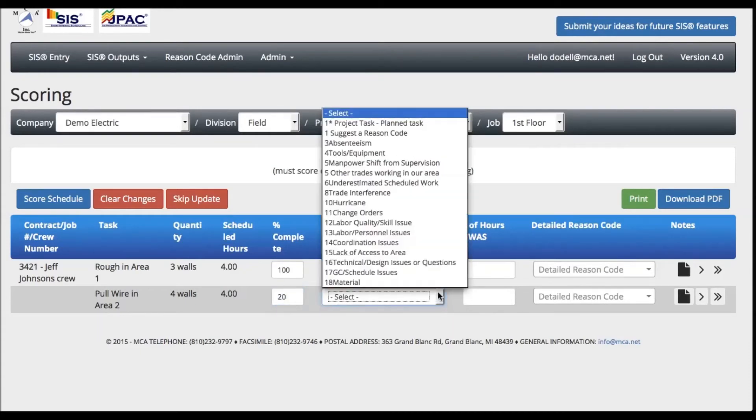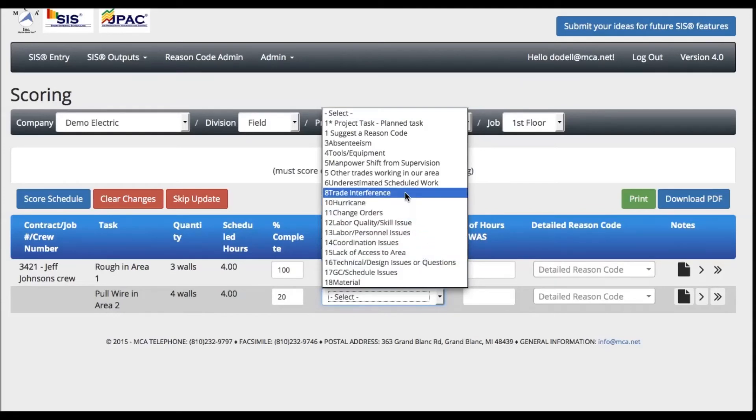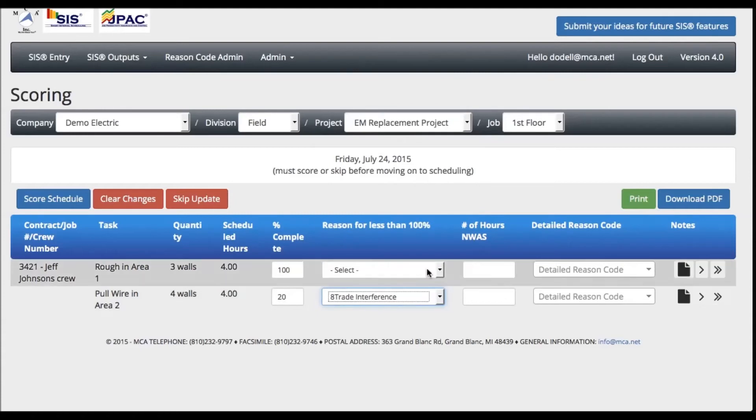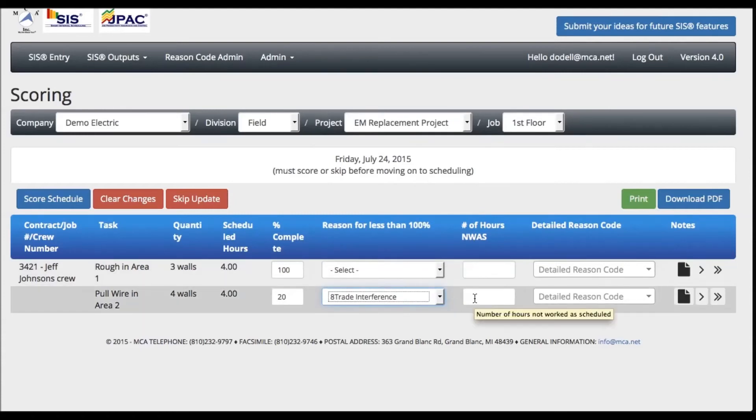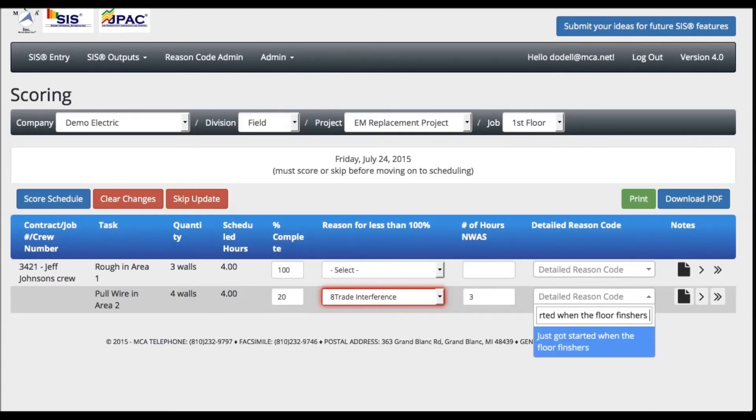If your task is less than 100% complete, choose the reason code that best represents the obstacle responsible for the task not being completed. You will then enter the number of hours not worked as scheduled. This can then be elaborated in the Detailed Reason Code section.